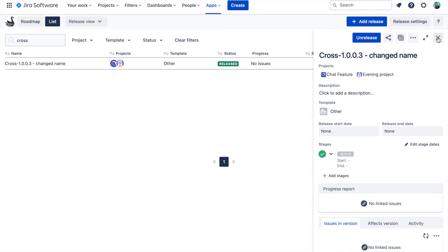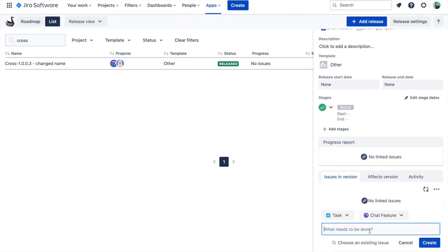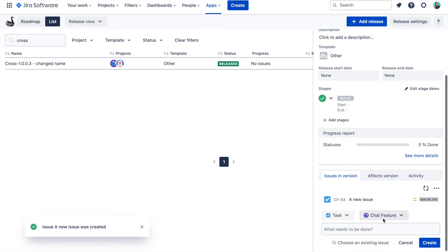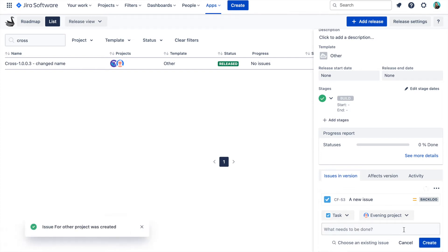Let me first show you how you can do that from Swanly. Here in the release detail report view is a scope section where you can simply click on the add issue button and link the existing issues from the linked projects to the release. Or you can create a new issue directly from here.